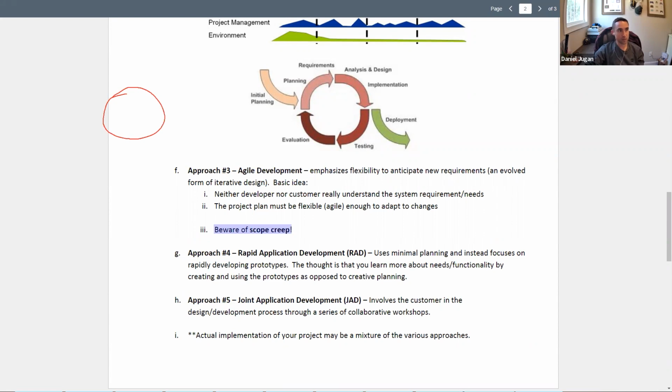But over time, as people make suggestions, sometimes your scope grows. We're like, wouldn't it be cool if we added all of these features? And then now your scope's up here. And someone says, well, I think that's good, but we should really be focusing over here. And so you take that thing and you shift it over here. Now you're talking about all this stuff. And then somebody makes another suggestion and now we're way over here. And so the scope or the focus of your project tends to move. And that's what you want to be careful of in an agile development system where you're so focused on being able to anticipate and handle new things that pop up. Okay.